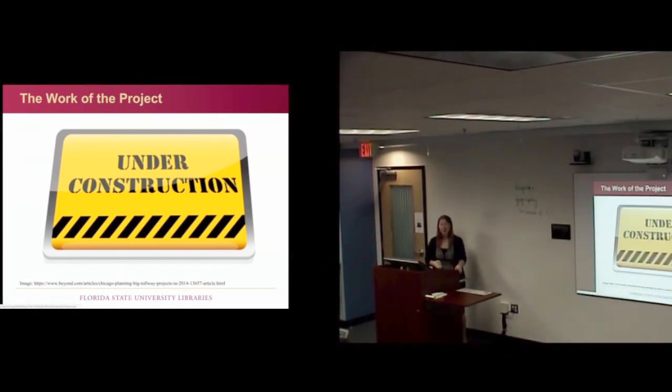So finally, after all of that planning, because planning can be really boring, I'm not gonna lie. And you don't have a ton to show for it when you get to this part, but it's really important. If you read most of the project management literature, they'll say you want to spend maybe about 25% of the entire amount of time you spend on a project in the planning stages. We probably spend more like 35%. We found it really, really beneficial to put a lot of time into all those planning stages before we get to the project so that things go a lot more smoothly once we get up and running.